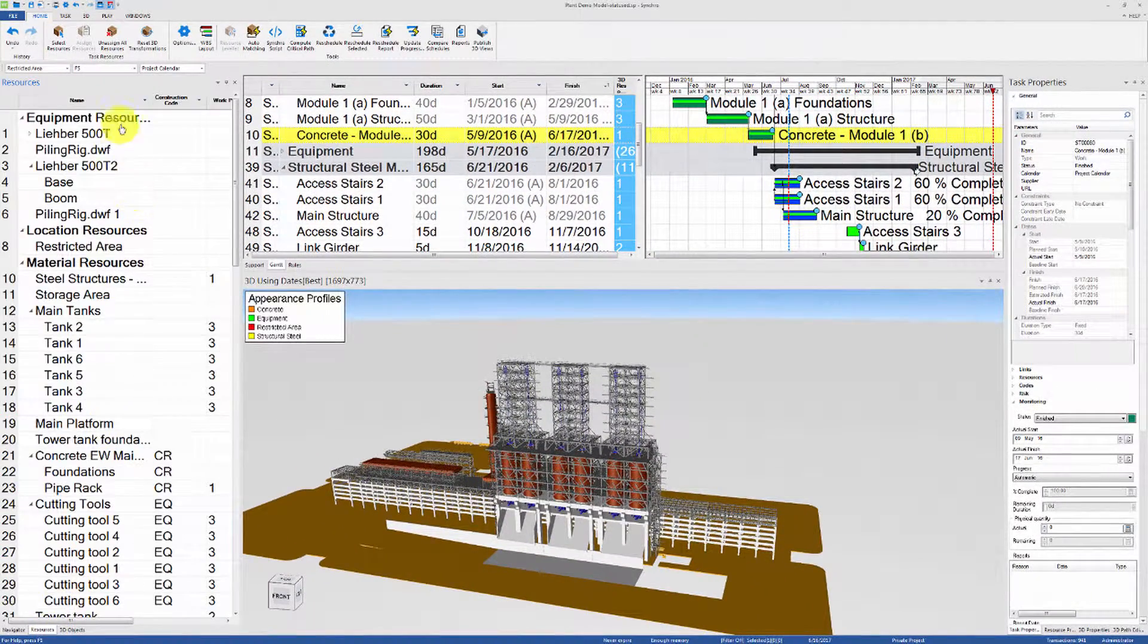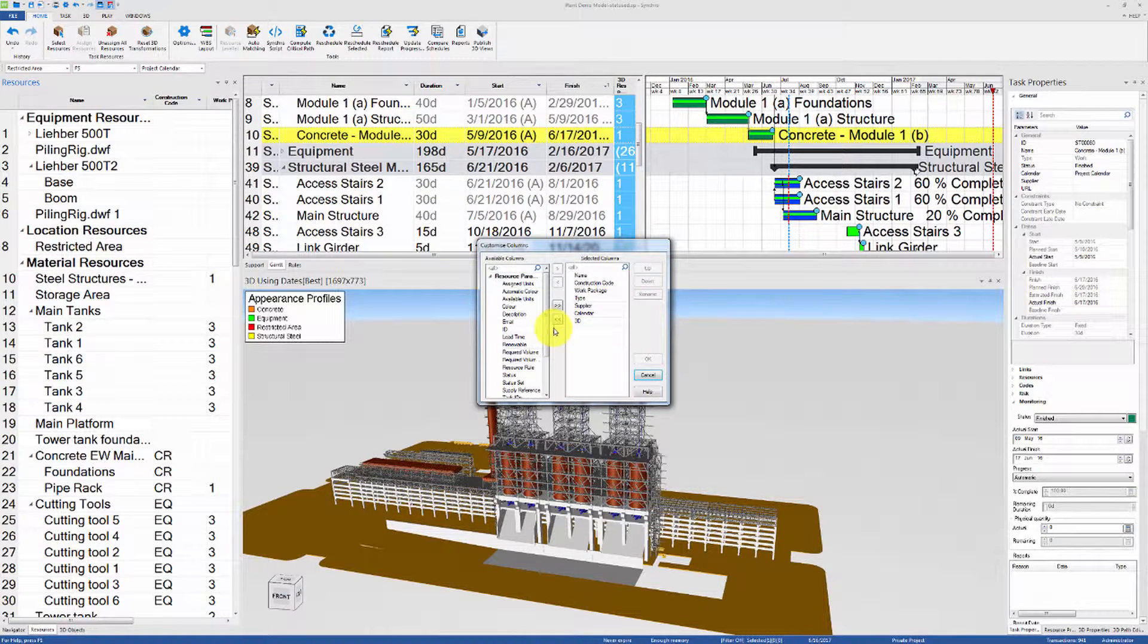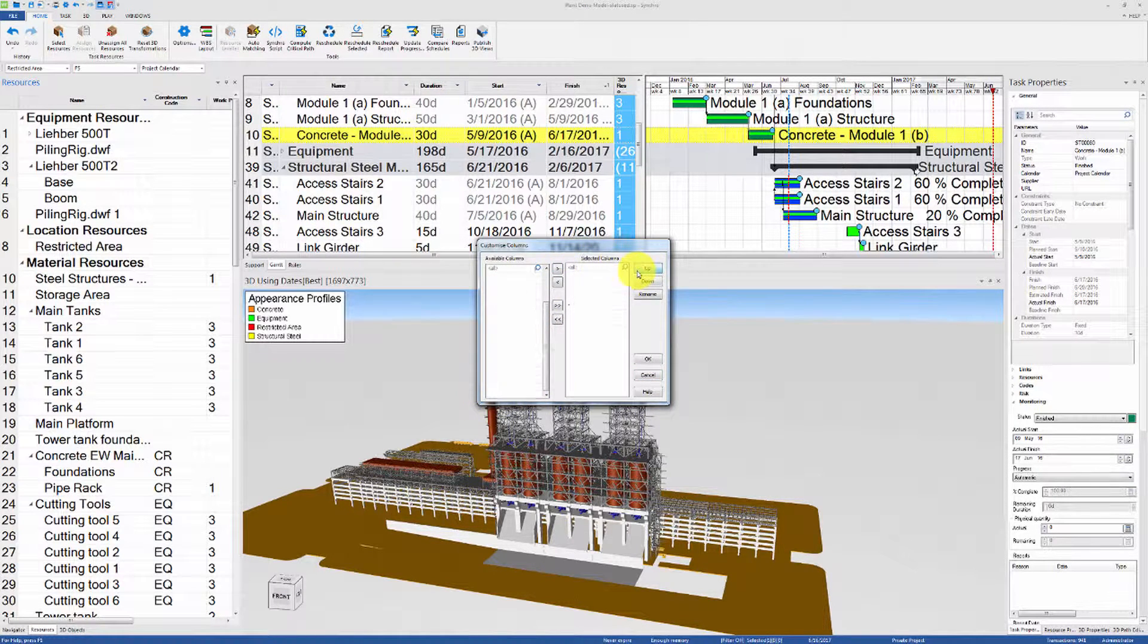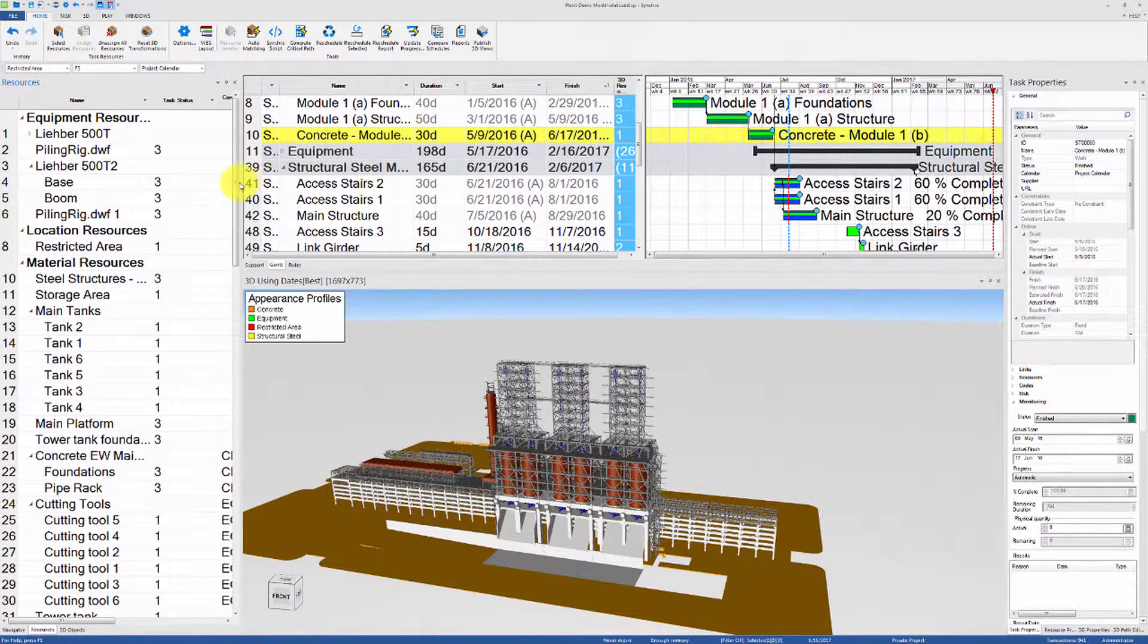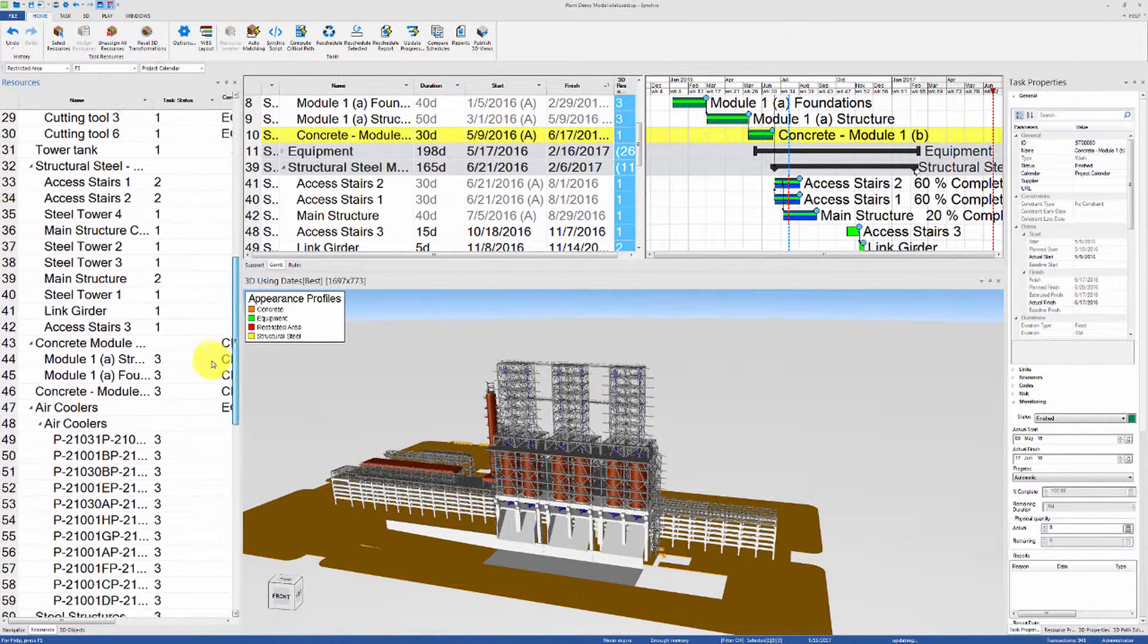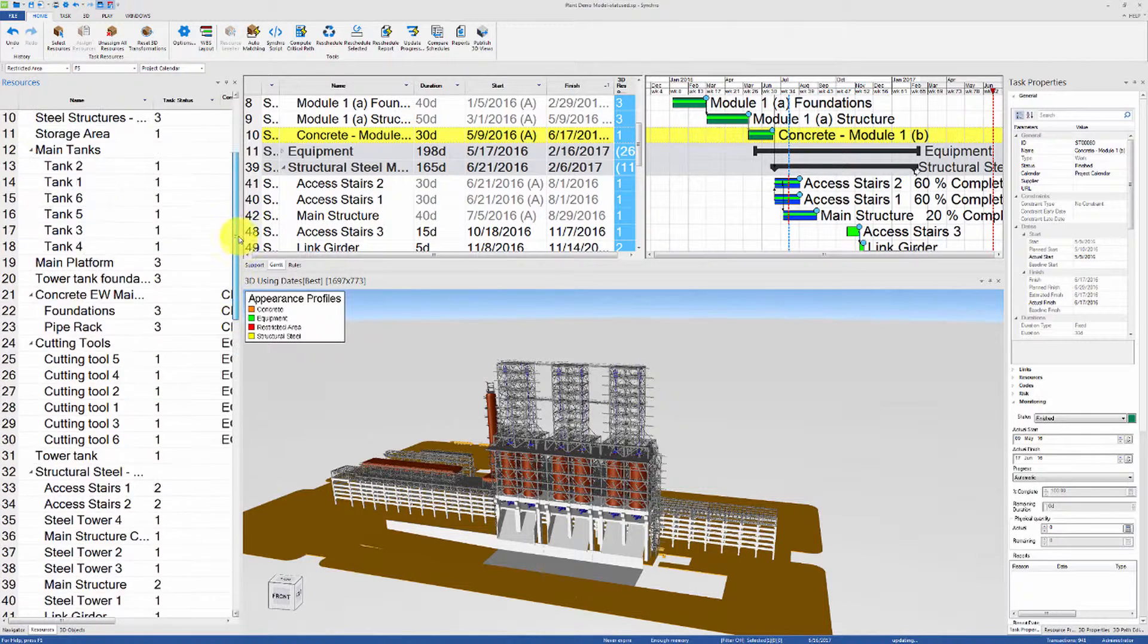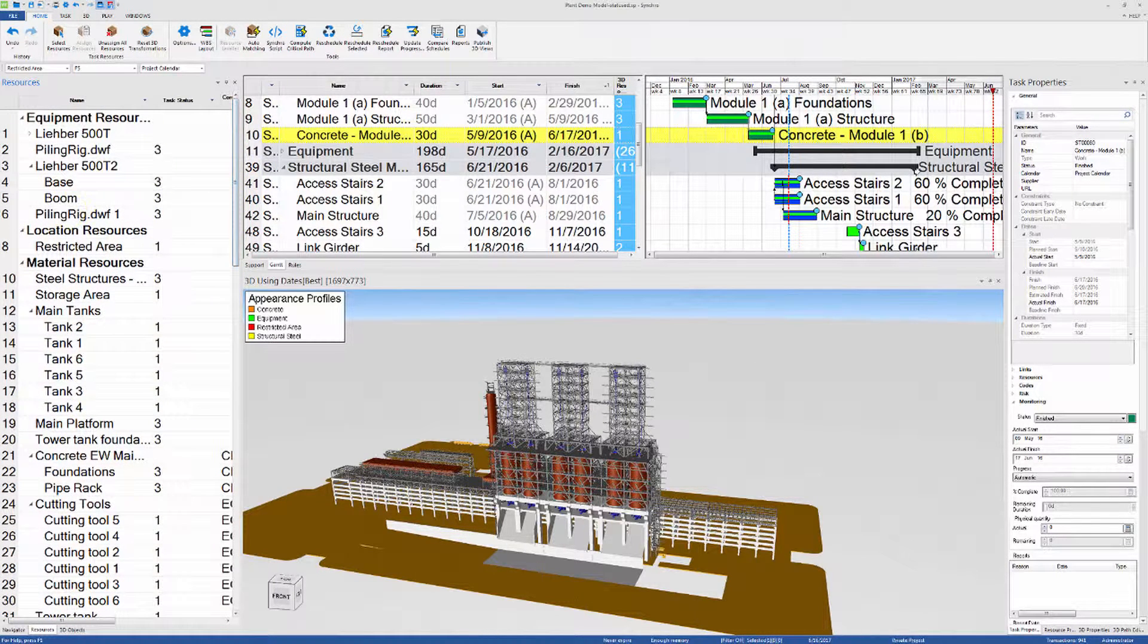Now let's go to the resources tab, customize the columns, and show the user field task status. The number three indicates that the task has been completed, two indicates that the task has been started, and one indicates that the task is planned but has not started yet.